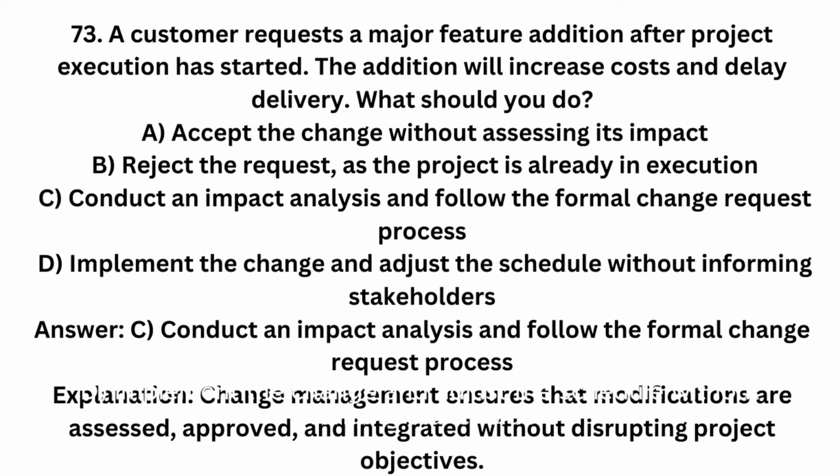D. Implement the change and adjust the schedule without informing stakeholders. Answer: C. Conduct an impact analysis and follow the formal change request process. Explanation: Change management ensures that modifications are assessed, approved, and integrated without disrupting project objectives.